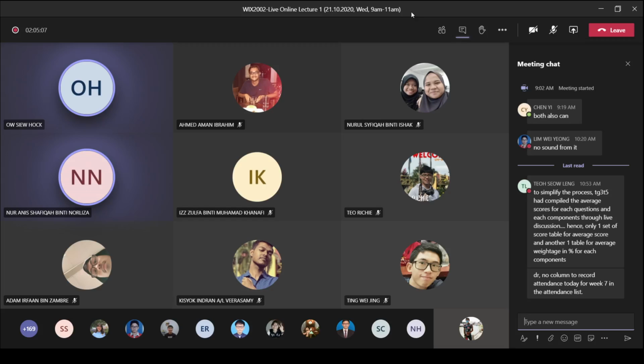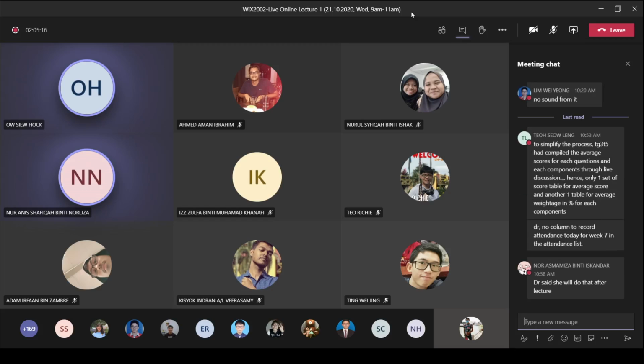So in this case, just now you mentioned, for example, you put the cost as 100 ringgit. But the actual one you end up with, after monitoring, because you increased the number from 120 to 240, the ending actual cost when you monitor is 500. You see now. So what is this 500? If you compare 500 with 100, that is a risk here, meaning that you underestimated the cost. So the risk event here is your cost estimation is inaccurate. You understand now? Okay.